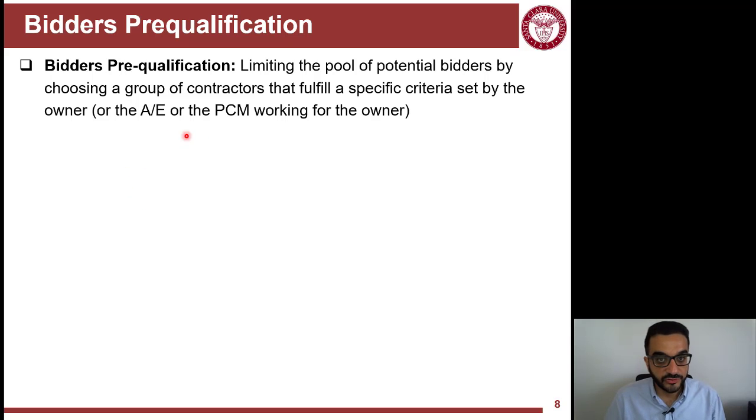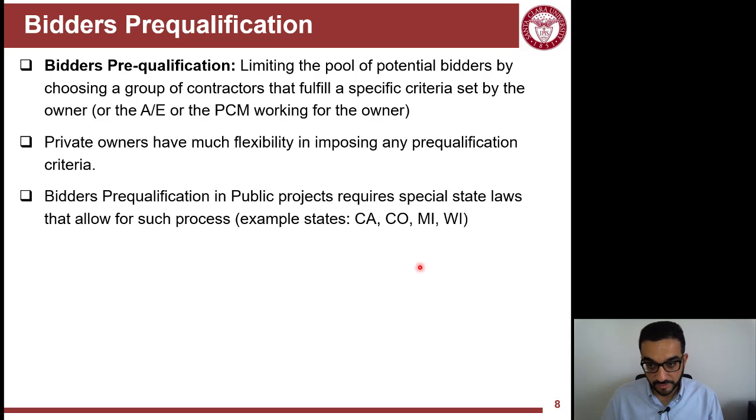One practice that is applied in bidding is pre-qualification. When you open the bid, sometimes the owner would like to limit those who can apply for this bid or submit bids to a limited pool of qualified participants or contractors. That's still fair if you think that you're setting requirements on who can submit based on financial qualifications or ability of the contractor's business.